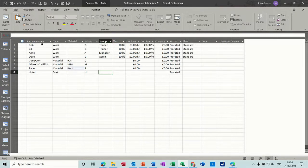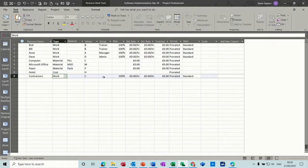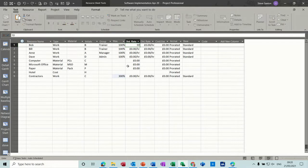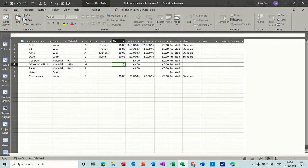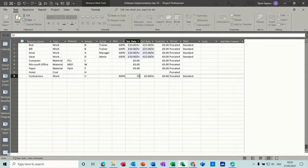On the work resources you can see the maximum is 100 percent, but you could also have contractors as a work resource and put that to 300, meaning there are three contractors. For the standard rate I'll put 10 pounds an hour and overtime rate at 15 pounds an hour. If they're all the same you can highlight them and pull down like you can in Excel. Contractors won't be getting overtime.